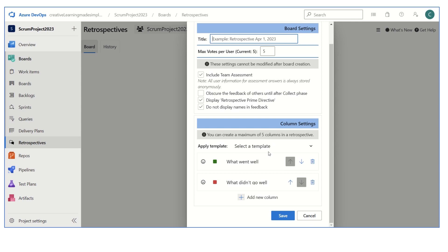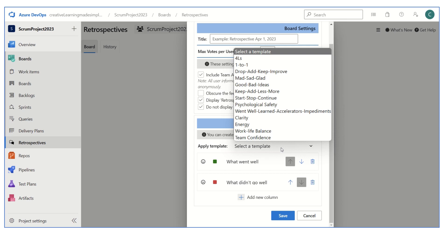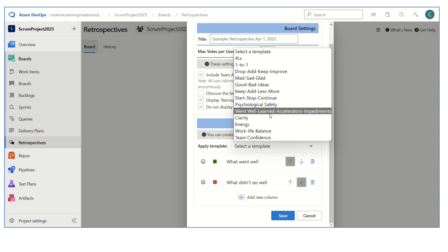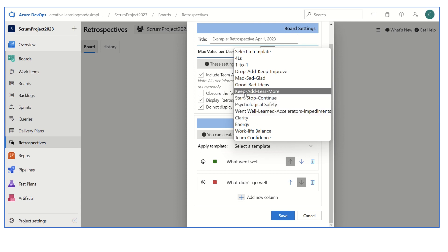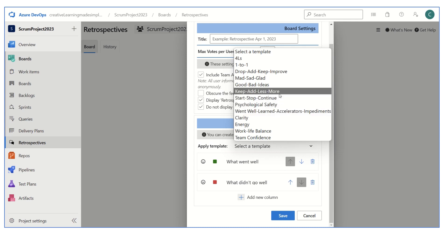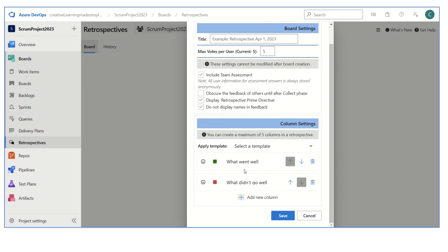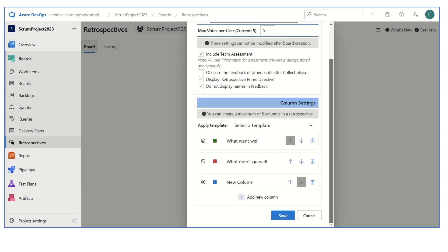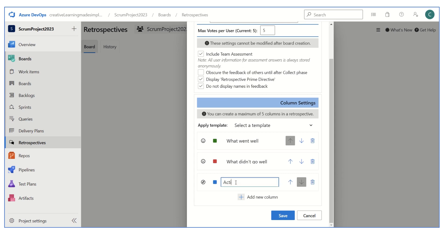The very common format is what went well, what didn't go well, if we want to capture the retrospective. Otherwise there are certain other templates that we can utilize like start stop continue, or keep add less more. We can apply these templates, but for simplicity I'm going to keep what went well, what didn't go well, and we can add a column which we can say is our action items. If I click on save...